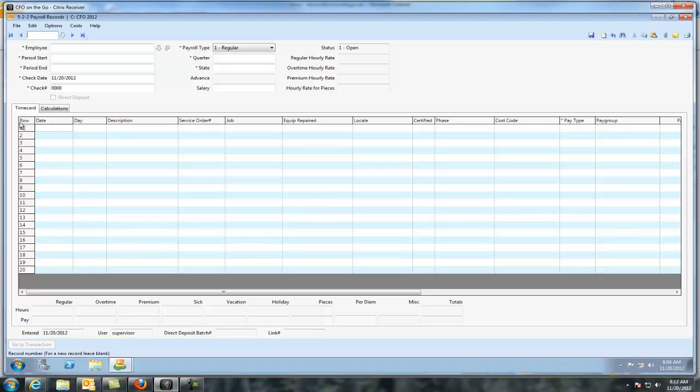But what happens, which is nice compared to QuickBooks, is let's say you're paying your guy $20 an hour. In QuickBooks, you're really only getting that $20 an hour charged to the job. And all that other burden goes into your overhead account. And here, anything that's labor related, workers' comp, Social Security, 401k match, health benefits, whatever, all of that burden is getting applied to that job and to that item, just the way you estimated it. So that's a big deal because the job cost becomes so much better with you getting that burden to the items.